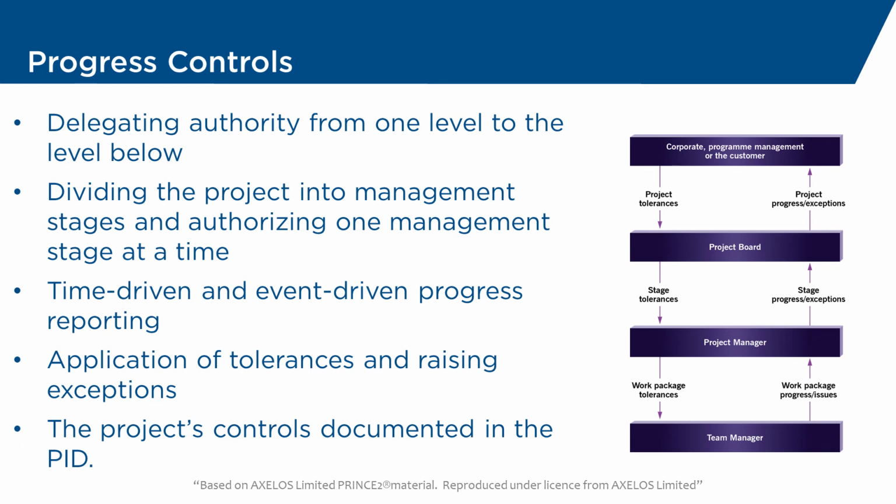All of these controls will be summarized in the project initiation documentation under the controls section, and this will help everybody to understand how we're applying control to the project and what it means to them.